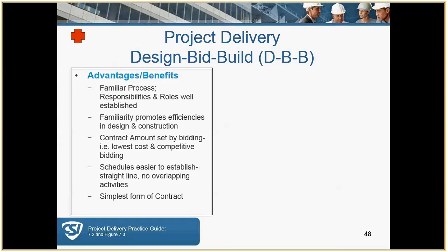The contract amount is set by bidding. So it's going to be the lowest cost and competitive bidding. And schedules are easier to be established as a straight line, no overlapping activities, and it's the simplest form of a contract.